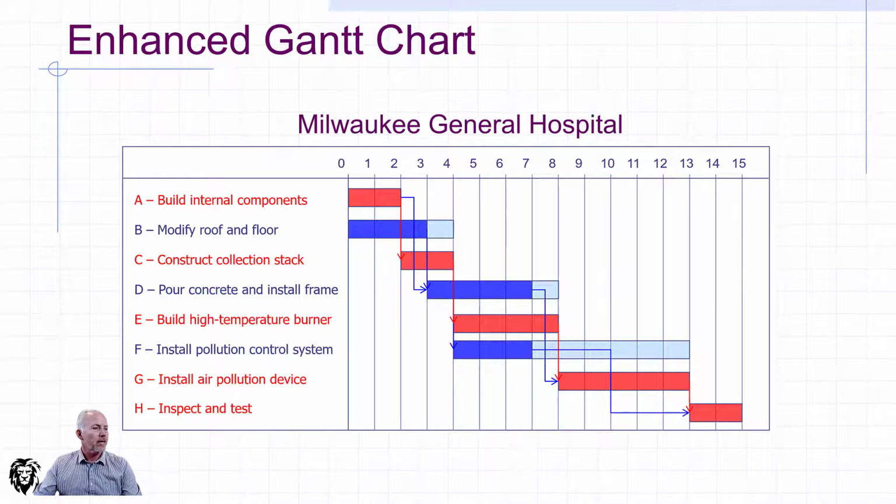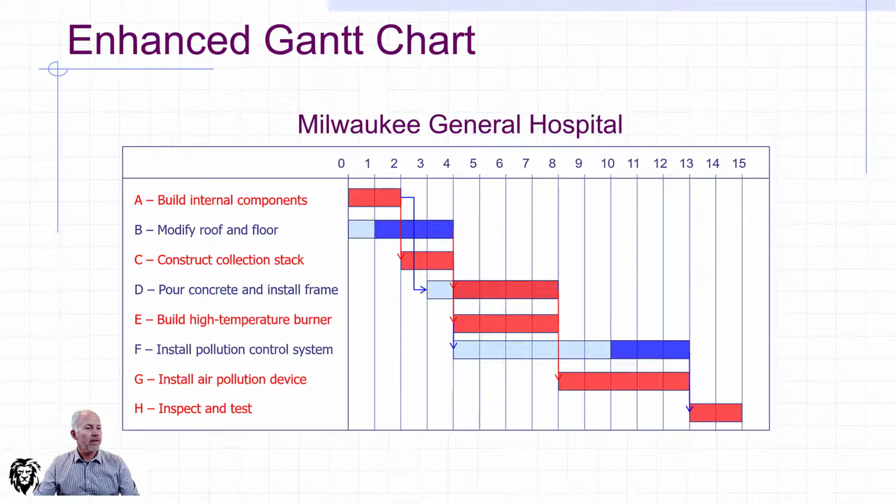our project on schedule. Now, with the predecessors shown, if I start to slide my non-critical activities, you will see that the rest of the diagram updates itself. So if I back up again, so I have activity B, if I start to move activity B for resource reasons or otherwise to the right, we can see that once I move a full day, activity D gets pushed with it because of their predecessor arrangement. And eventually, if it goes the full day, activity D now becomes a critical activity and joins a critical path. And we can move activity F and move it over.